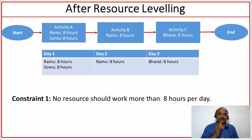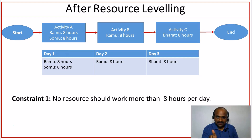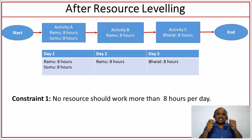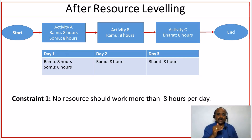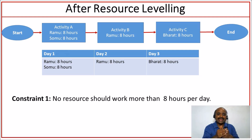The solution is that Ramu first works on Activity A for the first day. After finishing Activity A, he then moves on to Activity B. So to level the resources, we are making both Activity A and Activity B sequential. Earlier, the activities were in parallel form — the network diagram showed that both Activity A and Activity B could be done in parallel. Whereas now, Activity A and Activity B are brought into sequence just to make sure that Ramu works only eight hours on any given day.